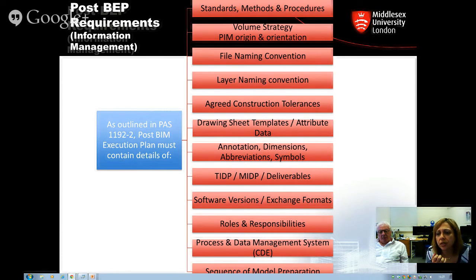Maybe the structural team is doing the ground floor, another team is doing the second floor, for example. So it's dividing up an area into manageable spaces that can be worked inside without another team working inside that one, all right? And I'll speak a little bit more about that again.